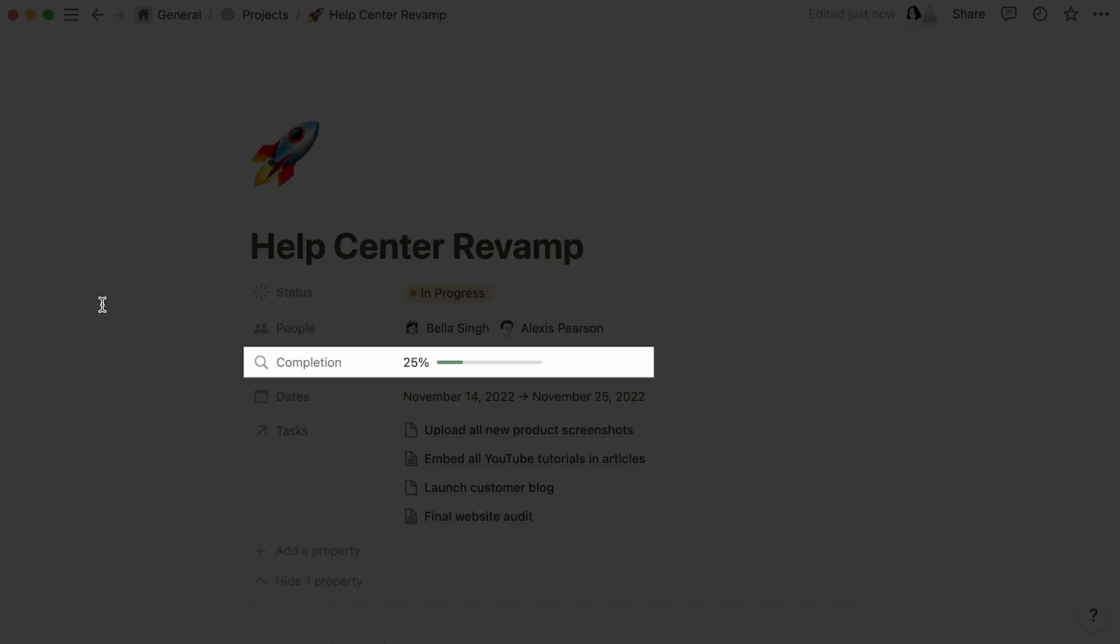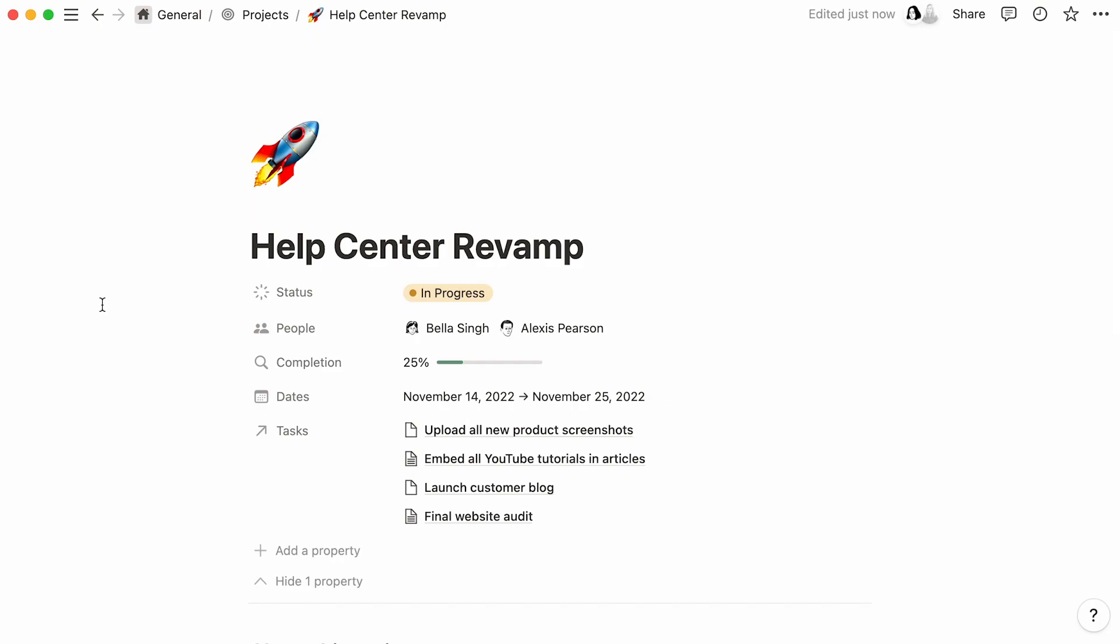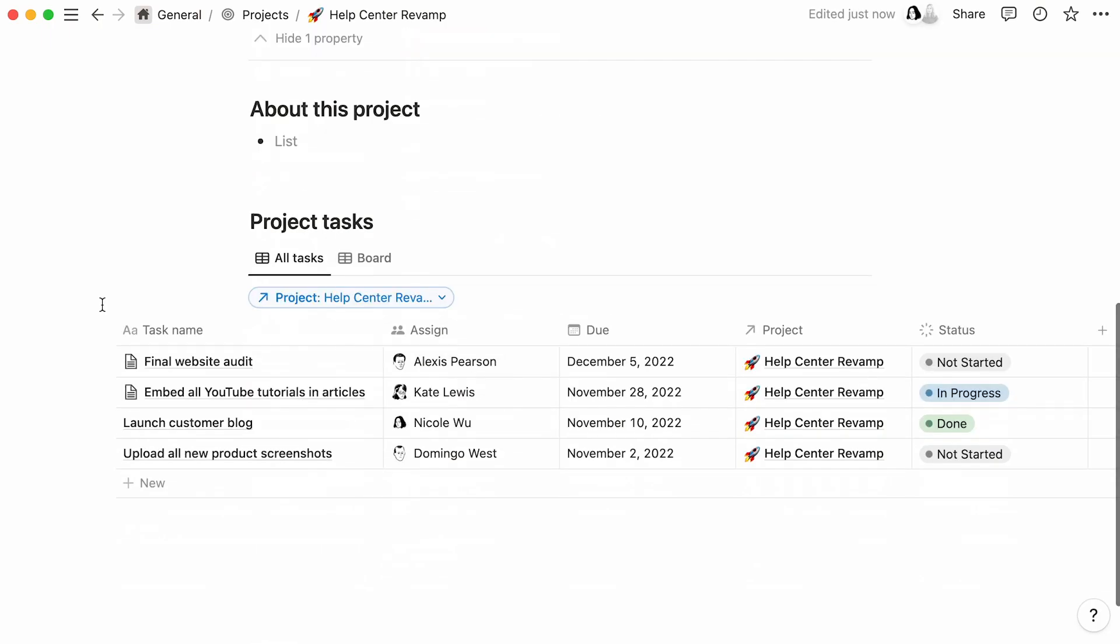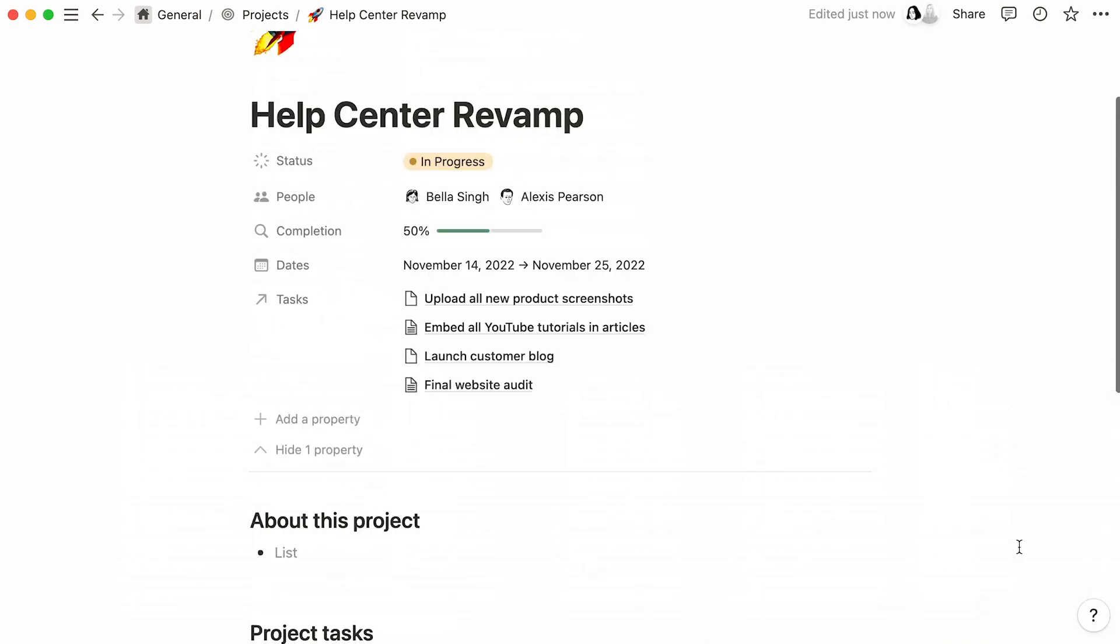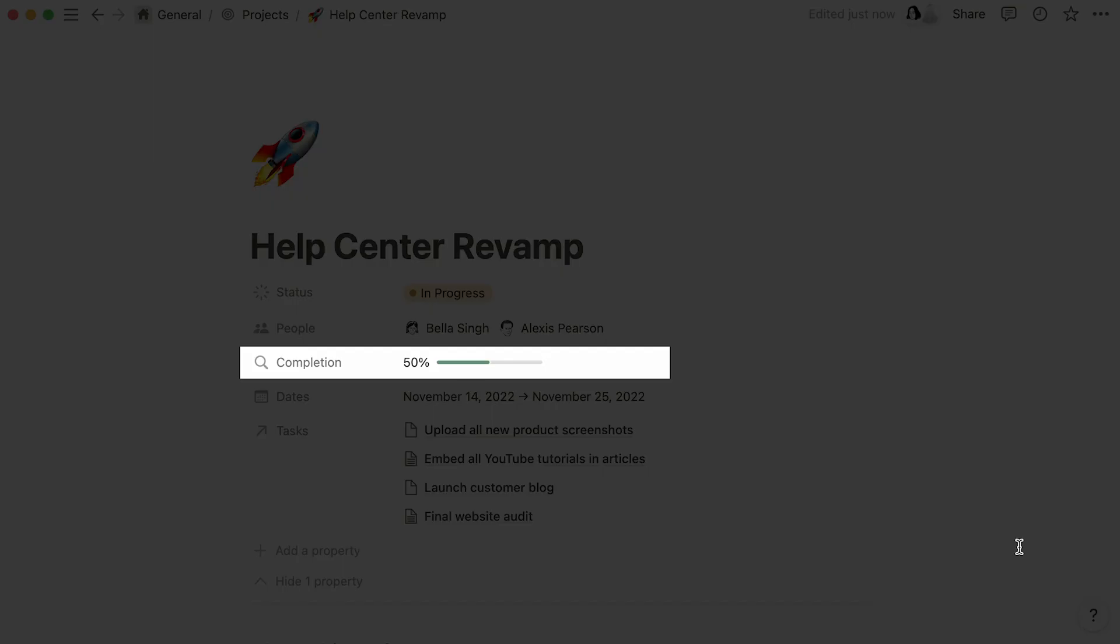Finally, this completion property is built into the template by default, and it calculates the percentage of tasks marked as done. In the case of this Help Center Revamp, one task out of four is completed, which makes for a completion of 25%. Now, if we were to mark another task as done, the completion rate would update accordingly.